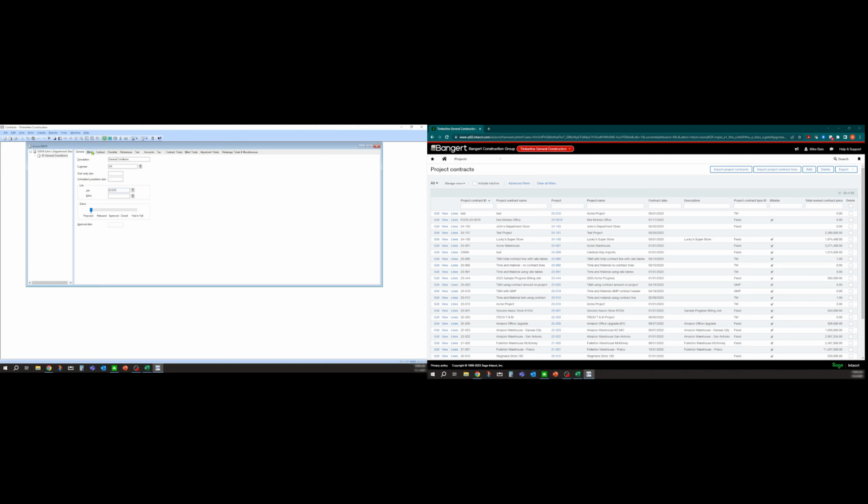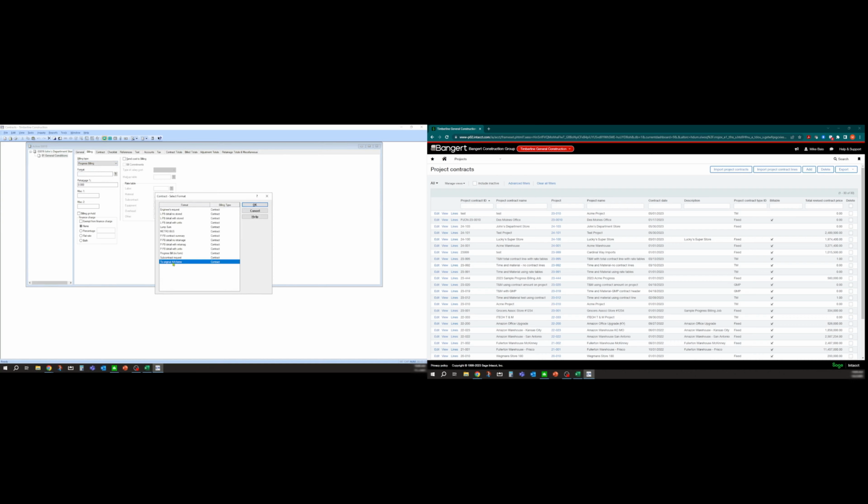And then I'm going to go to the billing tab. So this again is what information do I need in the system? So it's a progress billing type. Can do T&M here as well, but we're going to do progress billing for the example today. I also have to tell it what form do I want to use. So here's the AIA form. This progress billing form generates the lines and everything. So let's use this progress billing form.